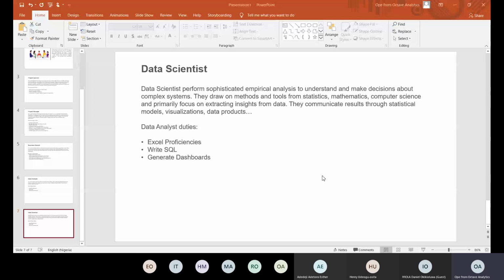And in your brief, no story at all. You just say what happened yesterday. Yesterday, I worked on the transfer feature, and I was able to create two logic that will do this, that will do that, and that's all. I don't have any challenge.